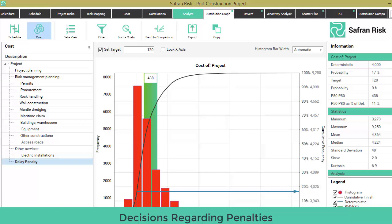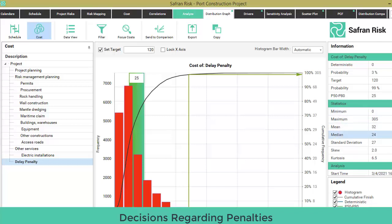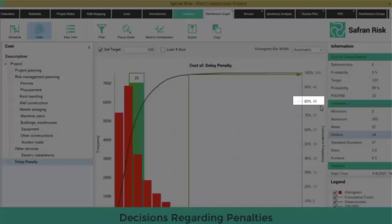Simply, on the distribution graph, select 'delay penalty' on the left-hand side cost description table, and you will see the chart immediately updated. You will read a median penalty of $24 million and an 80th percentile of $49 million, read on the left-sided vertical axis.